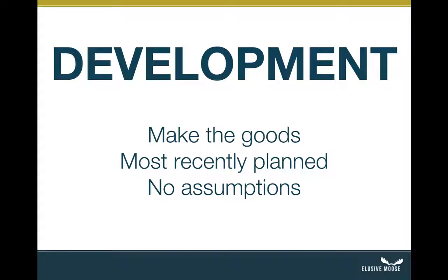I've had some very interesting experiences where I was engaged in projects where the business priorities themselves changed dramatically over the course of the project. And if I were to skip ahead and be working on features that were in the original scope of the project but were scheduled for a few months from now, by the time I get there, they may or may not actually be needed. So what I'm developing is just what I've most recently planned.